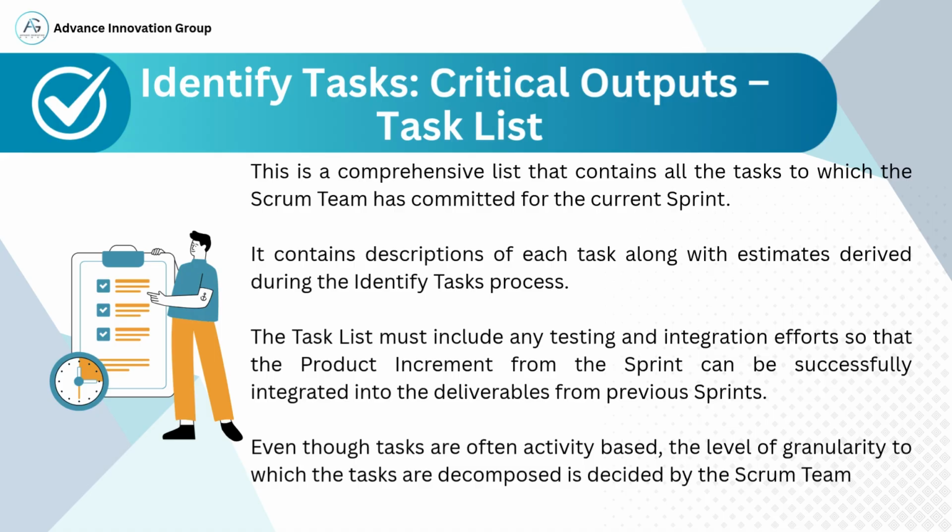Create API endpoint, write unit tests, update user documentation. The team, not the product owner, decides how deep to decompose. Rule of thumb: if a task is so large that its progress can't be seen within a day or two, break it down further. Living document.